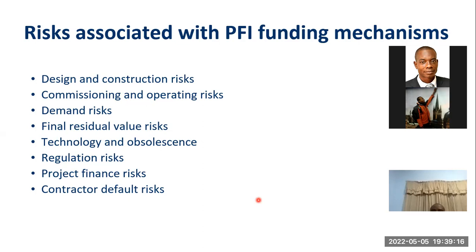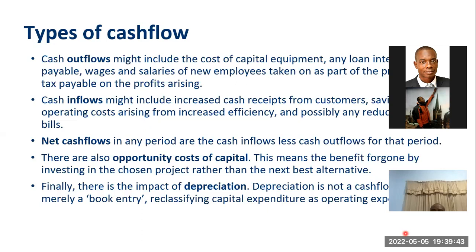And then project finance risk, yes. How are we going to finance it? Who and who are going to be part of it? How much will each person contribute? Then contractor default risk. If the contractor defaults in doing what they are supposed to do as a private sector, you are the public sector, what are you going to do? All these things must be clear, but they pose risk if they are not clear and if there's nothing you can do about them.